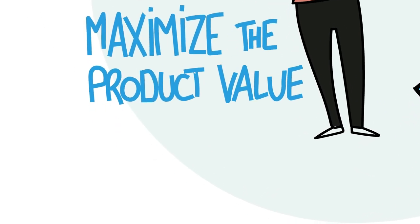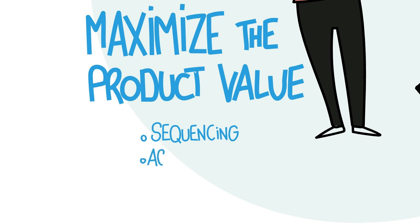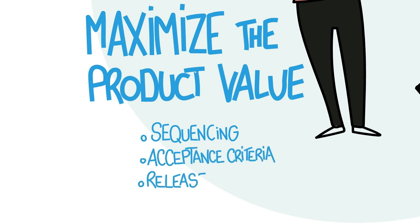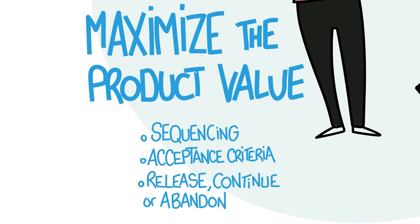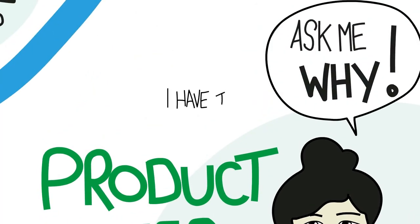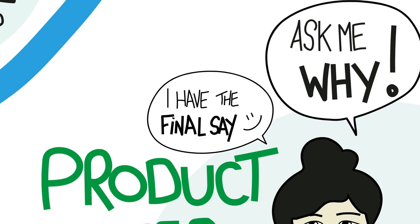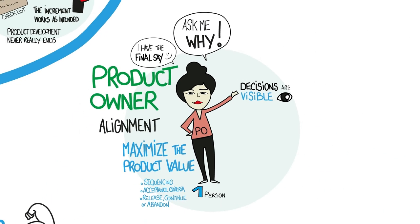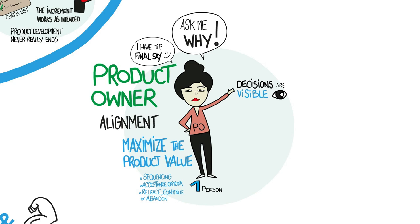These decisions include sequencing, acceptance criteria, and whether to release the product, continue development, or even abandon the effort. The product owner can decide what will be done first and can have final say both on the definition of acceptance criteria and whether an item is done. Since each increment is really done, whether to release, continue, or abandon becomes a business decision.